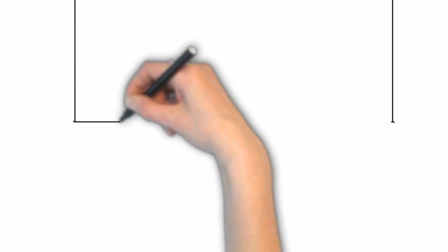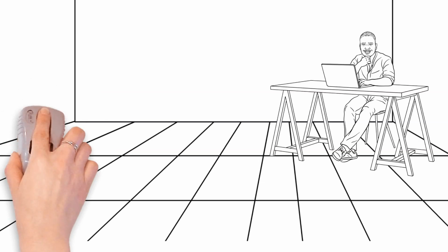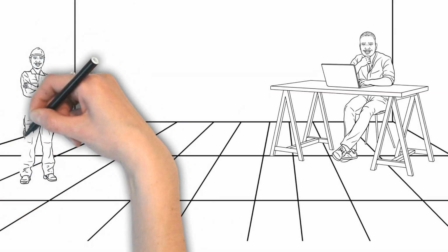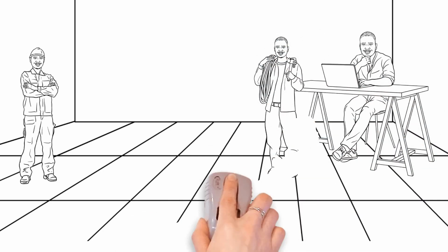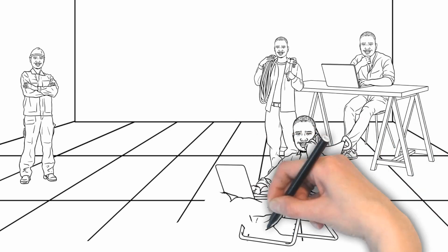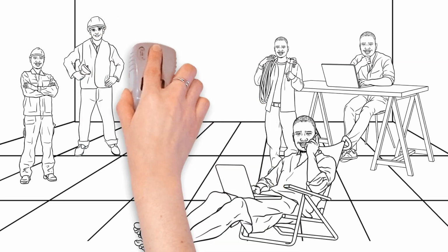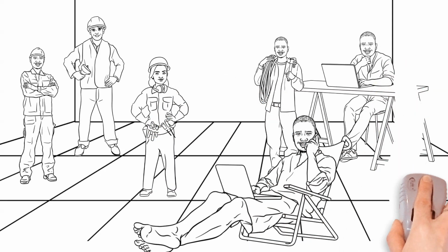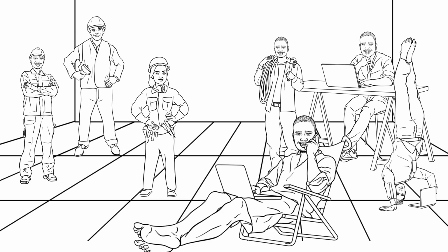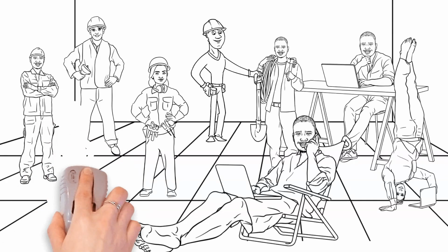Human resources are a unique resource to acquire for a project. It requires a good understanding of the skill sets that are needed to execute the project. Your core team to get the project started is almost always organizational resources and will help with getting an understanding for the project. You will probably already have a pretty solid work breakdown structure before engaging in acquiring additional internal or contract staff. Some organizations have a human resources department to guide you with the process of acquiring resources. So you will be involved in the interviewing, job posting, internal or external, and the selection of the desired human resources that meets the project needs.